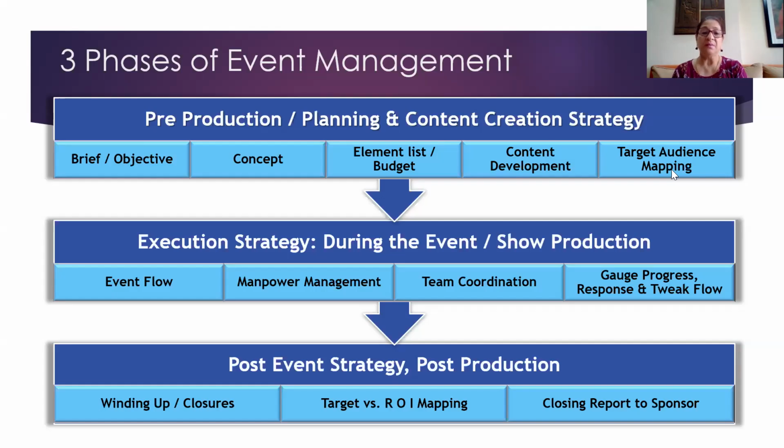Come to manpower management. You need to decide what your team is going to be. Now, every team has a different role to play towards all these phases. In the beginning, pre-production stage, they are doing all the sourcing, they're calling the vendors, taking quotations, putting down the budget list, confirming that this is done, concluding a budget list, content department is working on the content development. Everybody is doing their own different work at that stage.